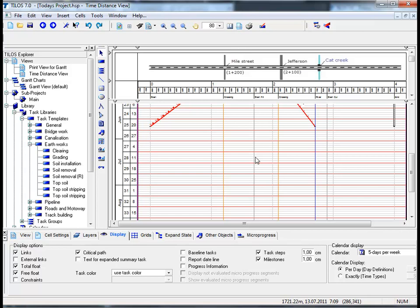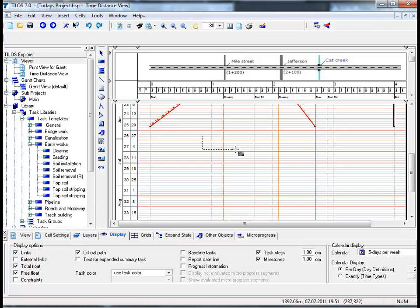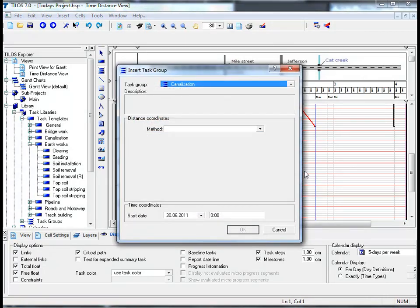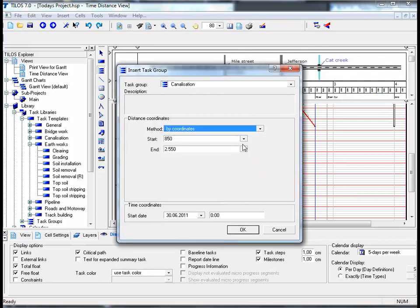I'm now going to show you how to insert task groups, since a general assumption in linear scheduling is that work crews perform their work one after the other along the right-of-way. Go to the Insert Objects Toolbar and click on the Insert Task Group icon, then draw a rectangle in the main working area using your left mouse button and a dialog will appear. The easiest way to insert a task group is by coordinates - go to the Method field, choose By Coordinates, and enter Start Coordinates of 2,700 and End Coordinates of 1,200, then click OK.